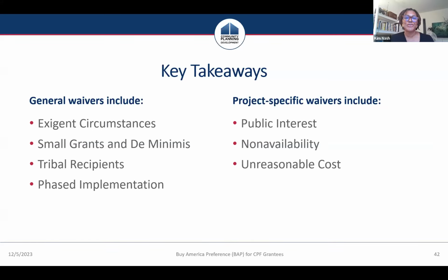First, make sure you're evaluating all of your projects and activities to determine if the BAP does or does not apply, and then document that decision in your project file. Second, make sure you are passing down the BAP requirements to subrecipients, contractors, and vendors. And keep in mind, if you have questions after this webinar, you can submit an AAQ through the HUD Exchange for additional guidance. Thanks.